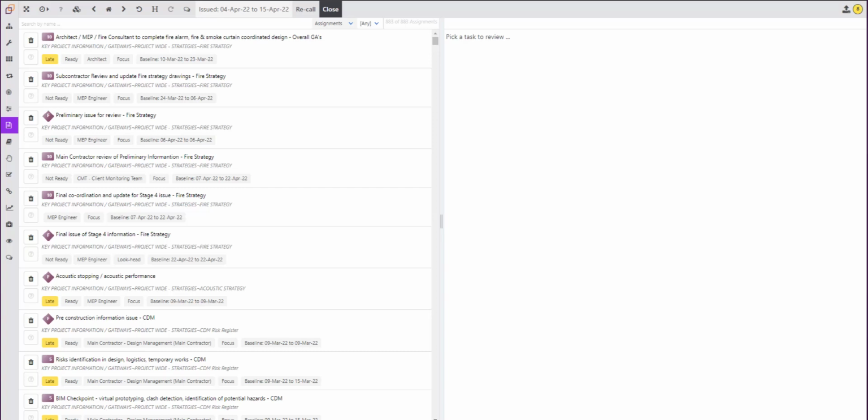Once the reporting is over, and you are confident that the current work plan is completed and you need to issue a new one, hit Close and define the dates for the new work plan. Once you are happy, remember to click the Upload button, and now that the work plan has been created, it can be reviewed by the team members for reporting progress.